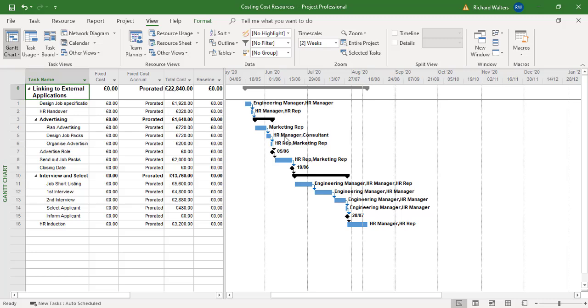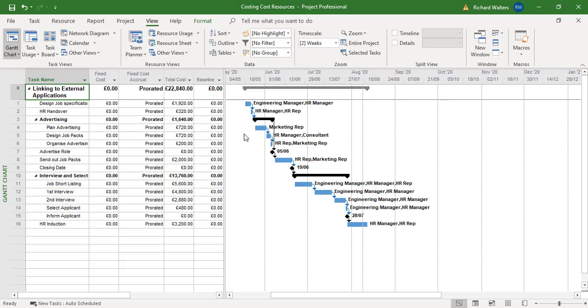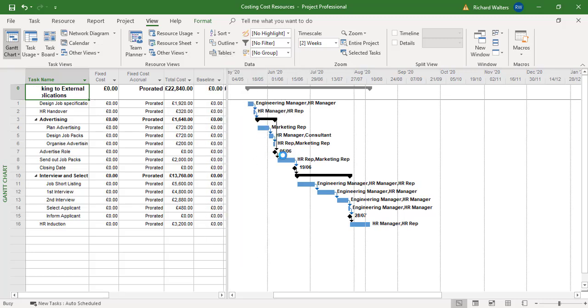And that's against the rate applied to the HR manager. So let's say the consultant charges us £1,500 for helping with the design of the job packs. So that's going to hugely increase advertising, but it's also going to hugely increase the cost of the design job packs. So this is what we're about to do now by adding cost for the cost resource, which is a consultant in this example. So I'm going to change the table view back to entry.